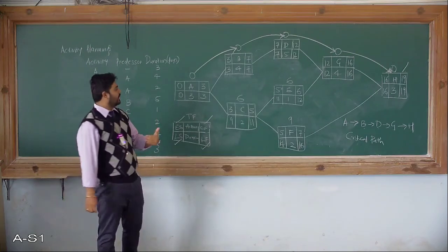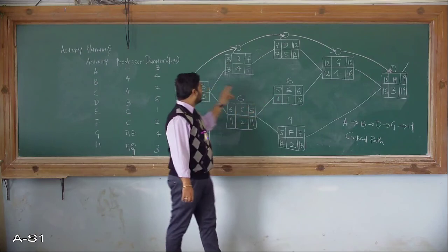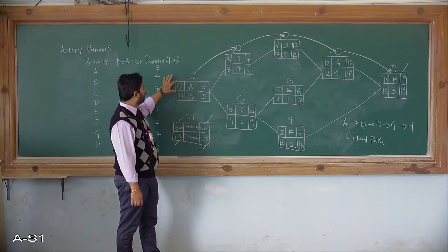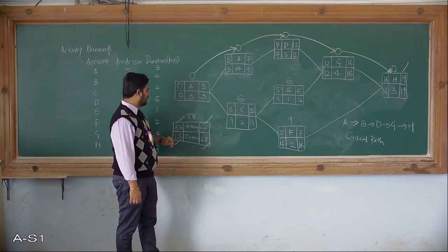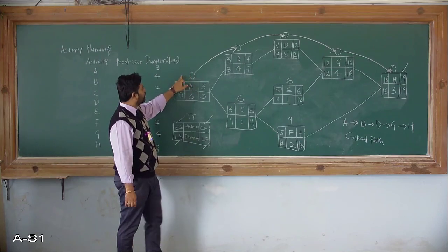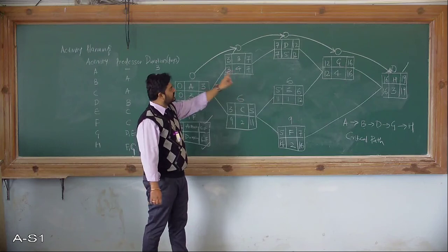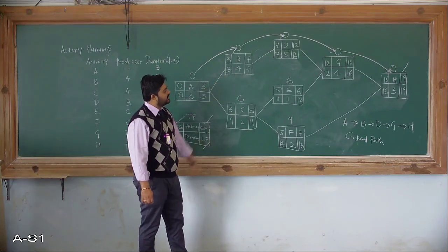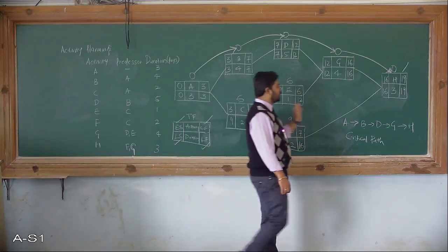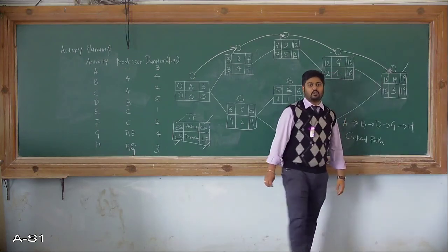If you want to do that, you should be ready to alter the total duration of the project. You cannot make any alteration in the duration or in the early start and early finish for that activity. If the total float is 0, you cannot change the identified time for that activity, because if you do so, your total project duration will be delayed by that much time or days.